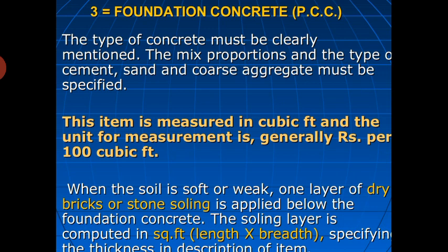When the soil is soft or weak, one layer of dry bricks or stone is applied below the foundation concrete. The soling layer is computed in square feet, along with the specified thickness in the item description.